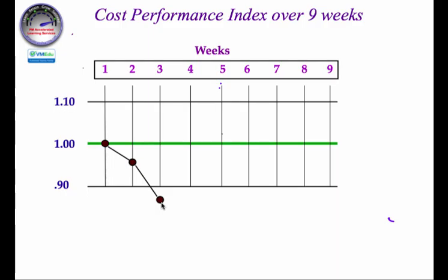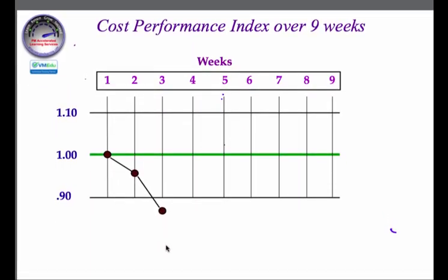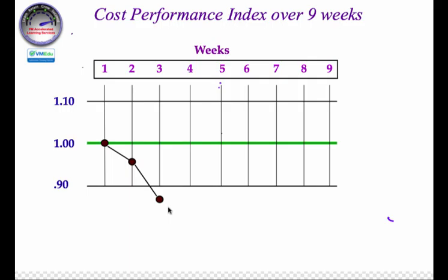What you want to do as a project manager is determine whether this is a problem or not, or whether a change needs to be initiated or a change request put in. How do you know whether to put in a change request? What you do is you take a look at your cost management plan. In this particular case, we're talking about cost.